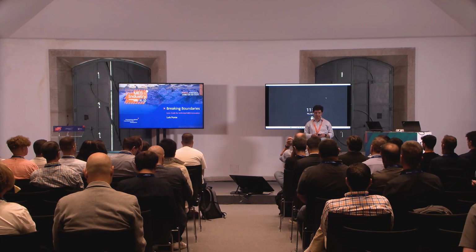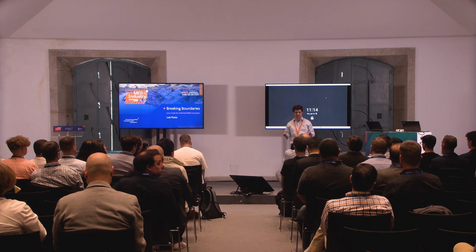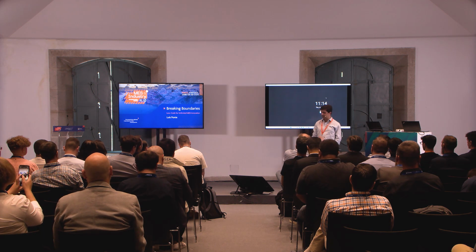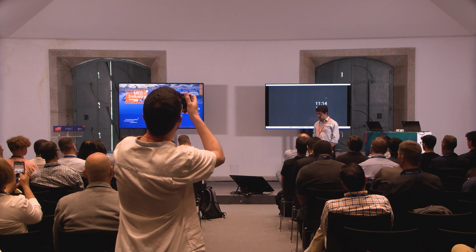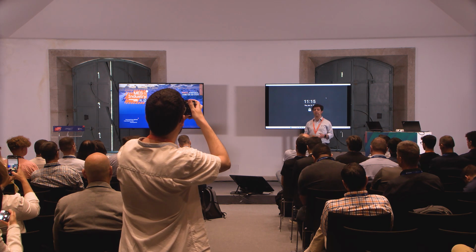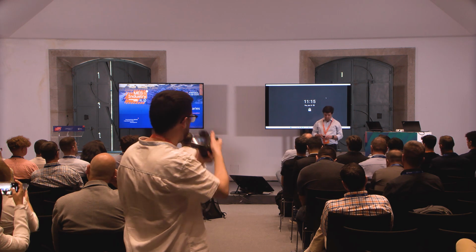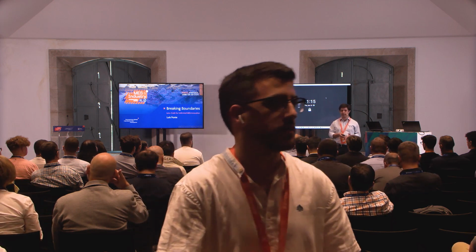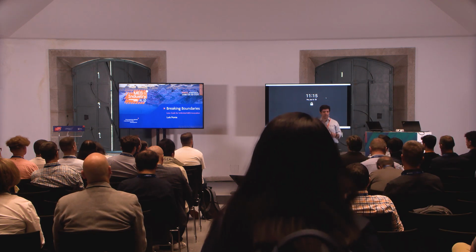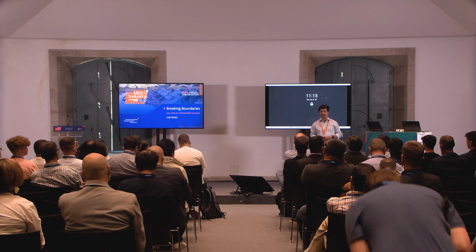And I've seen during all these years several projects running into trouble because they forgot this, and they were running an MES project just through the IT organization. But how often is production really involved in this, and how deeply, right? So frequently we see that production stakeholders are involved in the beginning, designing the solution, defining how it should look like. They are involved later, validating it even before it goes live, but they are not building it, right?